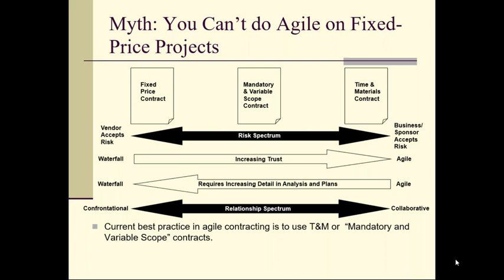It's establishing these reasonable budgets of what is an option, maybe a middle of the road option, but give them the cheaper and more expensive options as well. And then as the client goes through, they can make decisions later to choose specific finishes and things like that, fixtures. They can make those decisions and have that budget to play with. But to size the budget, we choose some default options to make sure it's enough. Did that help?